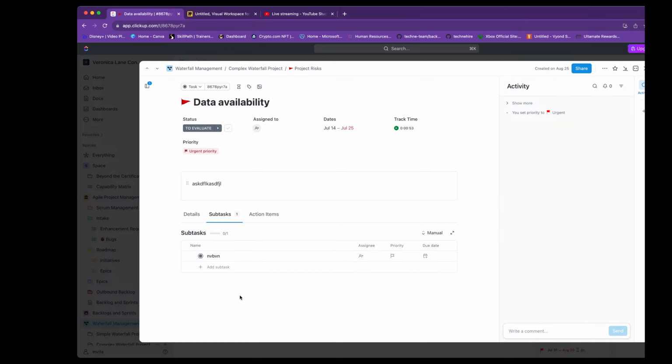So when we have first outlined all of the tasks that are tied to this project, you may have said, we're going to use our critical path for this. Fantastic, critical path and use. And now you're having conversations with those task owners. What I like to ask them is, okay, Bonnie, the world was a beautiful place. How long should it take you to get data availability completed? If everything in your life sucked right now, how long will it take for you to get data availability completed? If it's probably going to take this long, can you tell me how long that will take?